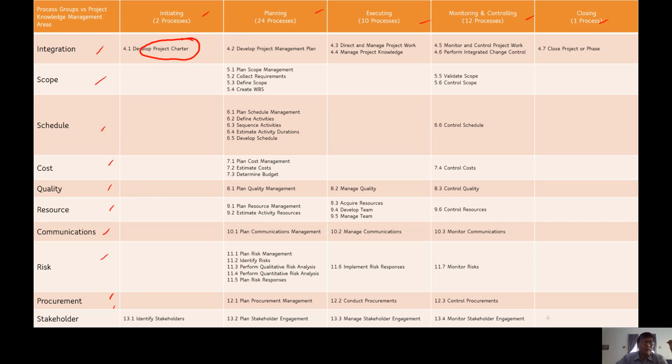For instance, let's take an example. Vaccination. Going by the details from the mass media, let's give you an example. Like 20 days, we have covered, let's say, 200,000 vaccinations. Now this I'm talking about single dose vaccinations. So 20 days, 200,000, which means 1 day, we are looking at 10,000. So when are we going to get 1 million? That's probably 100 days.